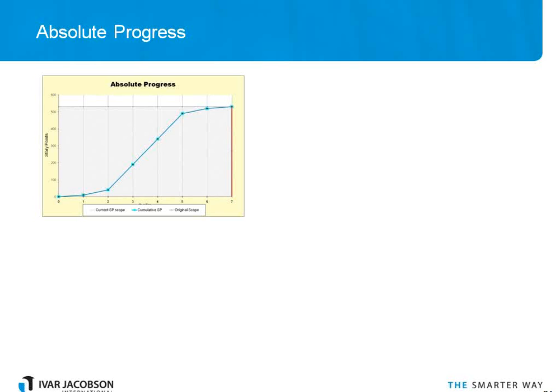Okay, so what about the progress? Now, I like to do a burn-up chart for progress. I'm not very fond of burn-down charts for measuring, say, release burn-down, because of scope changes. In fact, they tend to end up going negative. What's your target? Here we've got a clear target. You can see the black line shown with the grey area. That's our target at the beginning of the project.